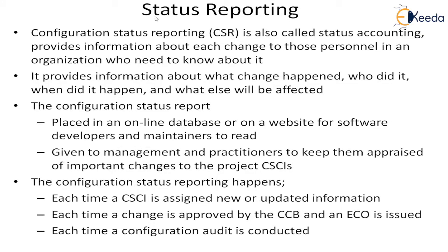The final one, we come to the status reporting. In the status reporting, it is also called status accounting. It provides information about each change to those personnel in an organization who need to know it. So there are a lot of people who are interested to know the status of the changes. There could be managers, there could be users, there could be team leads, there could be software engineers who are working on it. So a report will be created, and that report can be circulated or shared, or maybe they can query it and they can get it.